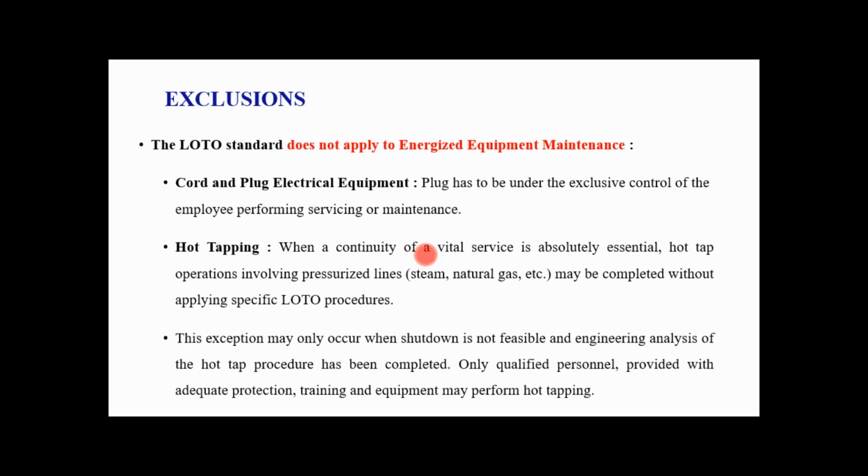Hot tapping: when continuity of vital services is absolutely essential, hot tap operations involving pressurized lines like steam, natural gas, etc., may be completed without applying specific LOTO procedures.